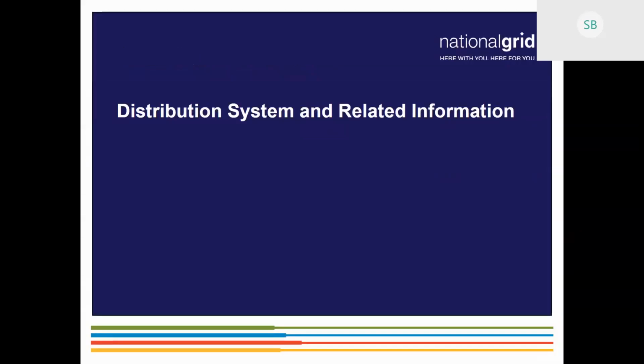So the question was about the Mass Smart incentive: after both meters are set, Clear Result needs the generation meter set email. Do you get both emails, and what do you give to Clear Result? When both meters are set, you usually get the authority to interconnect email first, and then shortly thereafter you get one titled generation meter set. That's the one that Clear Result needs in order to process the incentive.